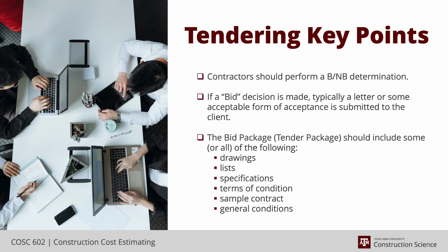Depending upon what FEL level we're at, if we're in FEL 2, then we're going to be doing well to have process flow diagrams or block diagrams and a conceptualized plot plan. That's about all that will exist at FEL 2.